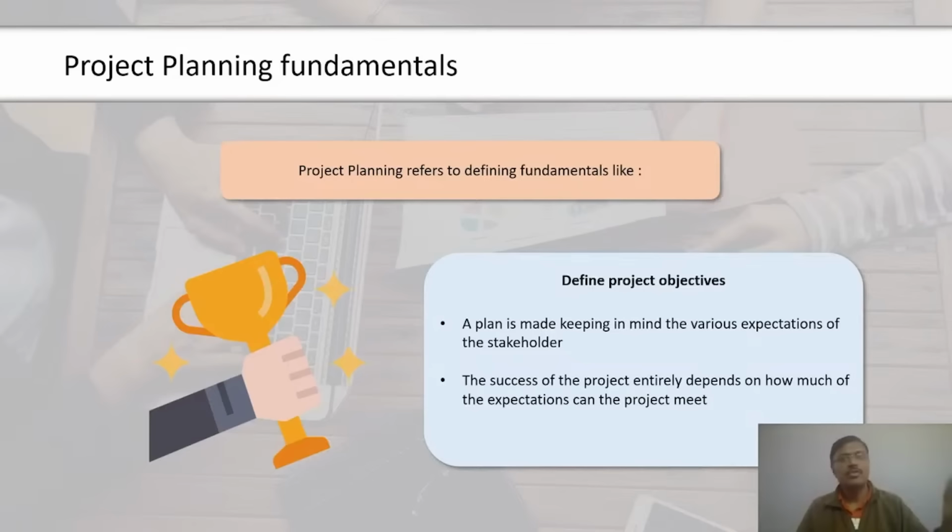Now, if the causes of variation are random, you can assume that the actual values will be evenly distributed about the mean and will follow the normal distribution, sometimes referred to as the bell curve. Further, you can use the properties of the normal distribution. There is a 68% probability of the actual value falling within first sigma from the mean, 95.4% probability for the second sigma, and 99.7% probability of the actual value falling within third sigma.